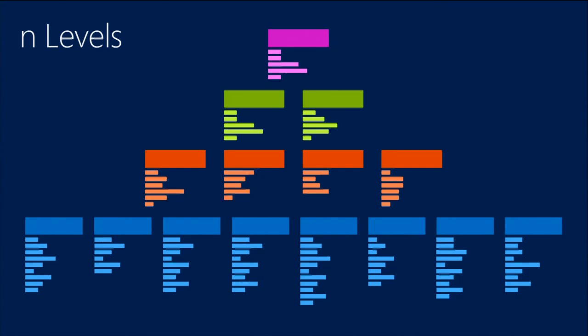So, for example, a common one might be you might have goals at the top, and goals might span releases. And then goals are fulfilled by initiatives. And initiatives are typically fulfilled within a release. So this is a goal for this is an initiative for this release that meets this goal. And then initiatives are then implemented by features or epics, or we call them experiences internally.